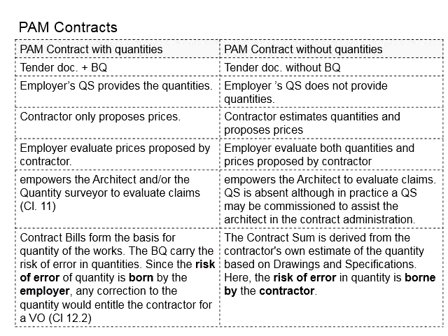That means when it comes to the underestimating of the quantities, the contractor is allowed to claim for variation order, which is VO, and the employer will need to pay for the costs. Simply said, the BQ is provided by the employer, so when there is error in estimating of the quantities, all the risks related to the error of quantities will have to be fully borne by the employer. This is because the contractor is actually proposing the price in accordance to the quantities given.